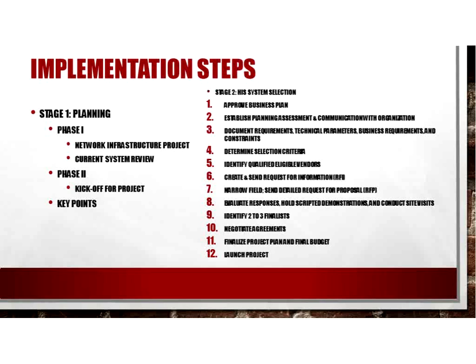And so when that first choice knows that there's another competitor, they'll do a little more, and it gives the organization a greater leverage with the vendors. Send your contractual guidelines to the finalist vendors as part of their finalist packet information. Include in those guidelines your negotiation of the agreement with that vendor that forces both parties to discuss the responsibilities for implementation, and then they sign on the dotted line, legally committing them to perform those responsibilities.